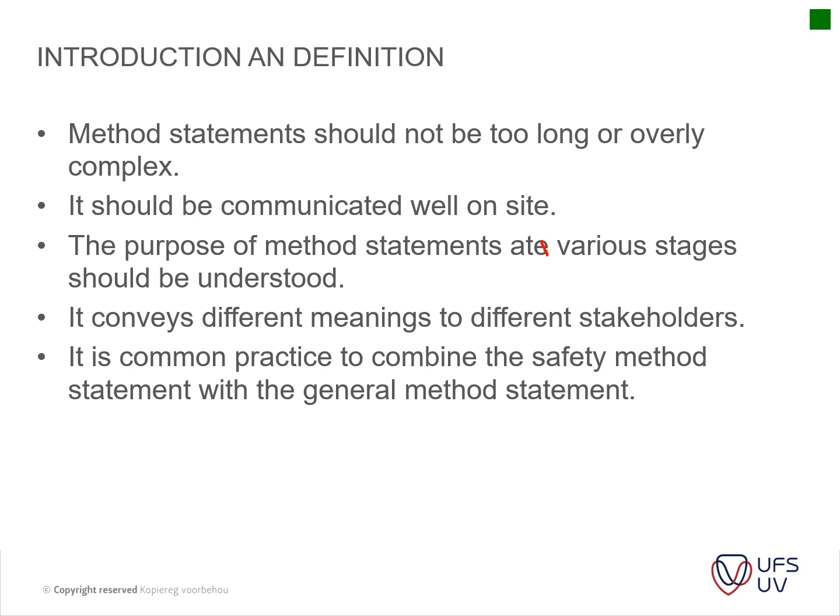For instance, with the examples that I've gone through for your pre-tender stage method statements, it doesn't help going into too much detail because you don't have the time and money to do so, and because you also don't have all the information yet. Maybe the client or the engineer will come back and say you have to use a concrete pump, or you can't use the concrete pump. You need to reverse your trucks in and go out again. So that's the stuff that you need to consider.